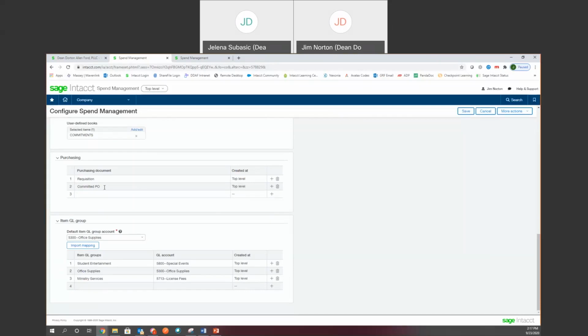So if you've got a vendor invoice that's come in, presumably they've already provided the services, they've already delivered the goods, and you might not be able to do anything about the fact that that blew the budget. But if you've got it all the way back when somebody's requesting to spend something that it's going to go over budget, you can reject that right then and there.